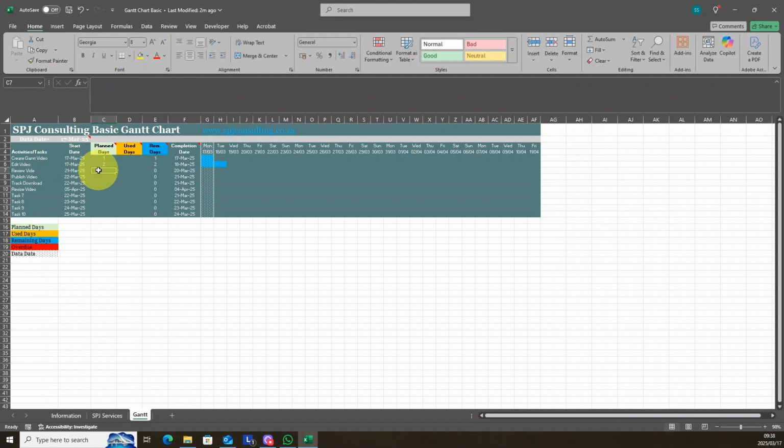Then review will start after the 18th, when that activity ends. So I'll make that the 19th of March. No, not 29th, 19th of March. And I'll give myself 1 day to do that. Publish video, or give me 1 day to do that.